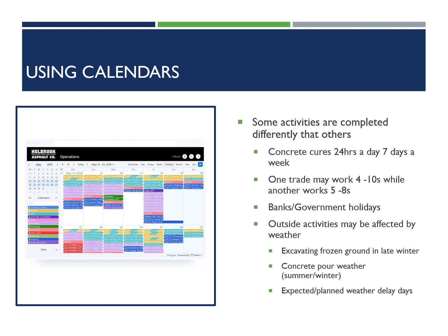So you can use weather data from weather.gov or NOAA and figure out what are going to be the factors that you need to take into consideration for whatever type of work that you're going to be doing that could be outside and affected by weather, and come up with a typical month.